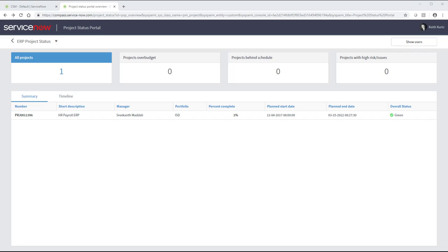The planned start date in this case is the actual start date and will not change without rescoping the project. The planned end date probably will change as the project progresses, status is marked, and individual tasks are completed earlier or later than planned. Overall status can be green, yellow, or red. This is set manually by the project team.